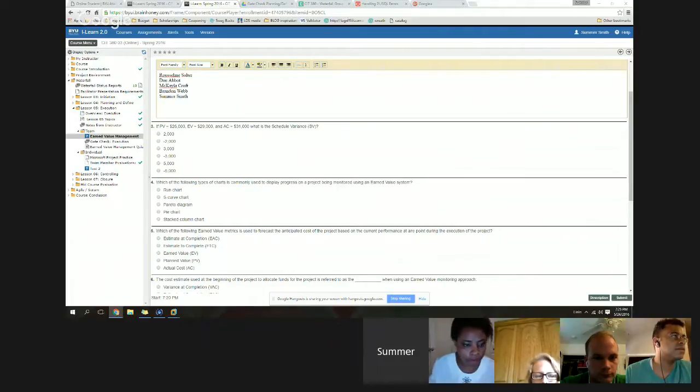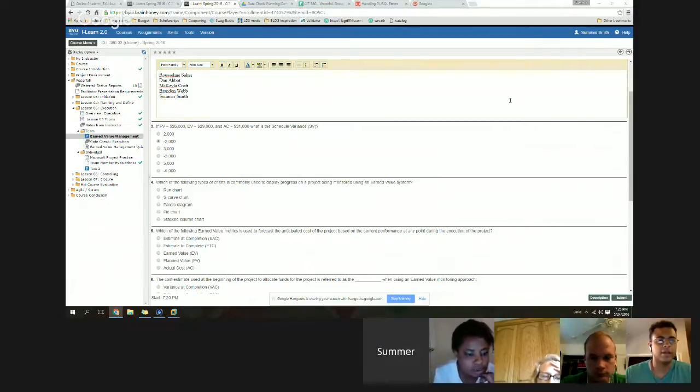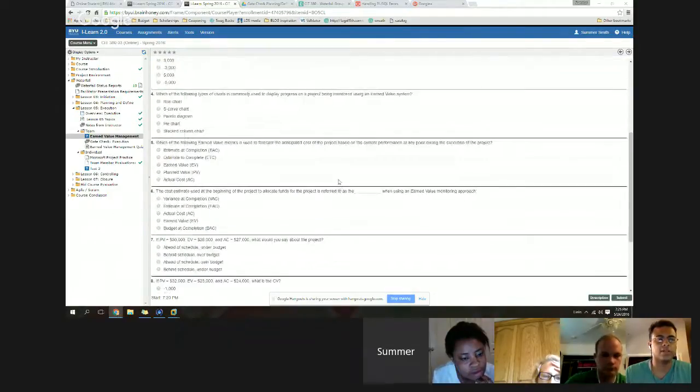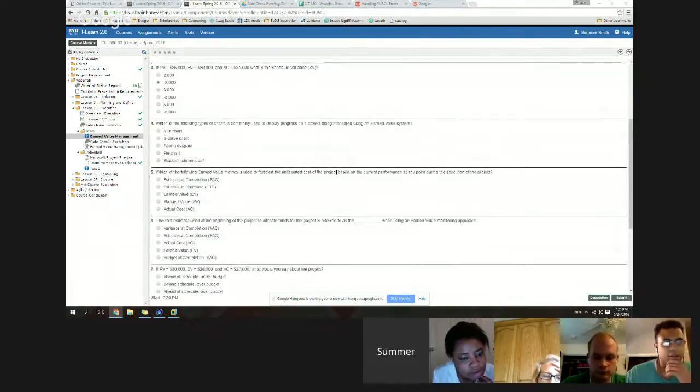PV, and AC, and earned value and actual cost. Planned, earned, actual cost. That would be negative 2,000. Because your planned value is 26. Yeah, that's how much you're planning to get. You earn 29,000, so that's 3,000 more than you planned. And then your actual cost is 31,000. So you should be in the hole.